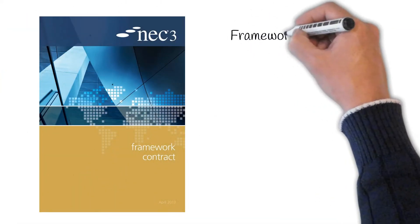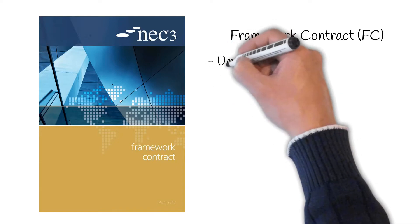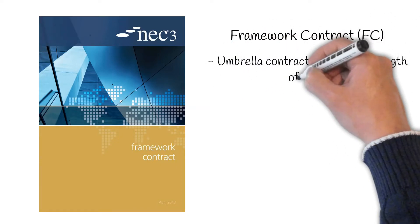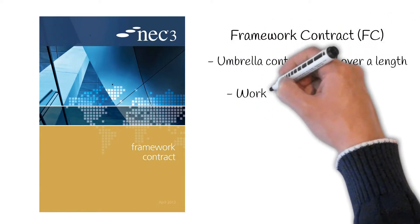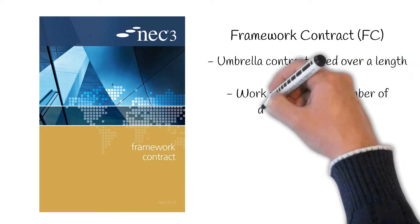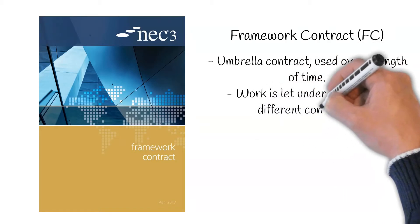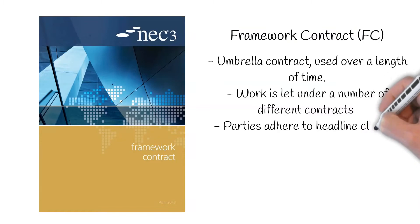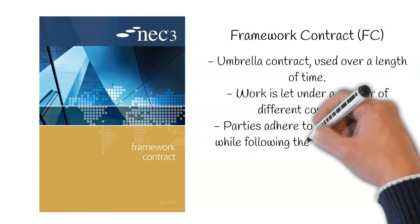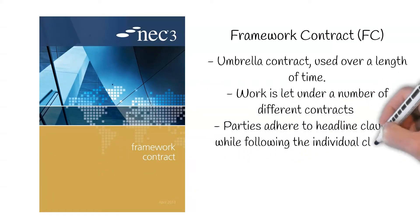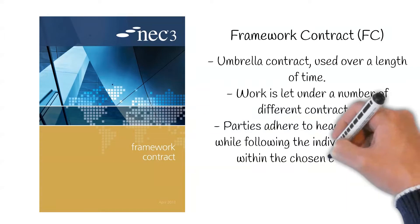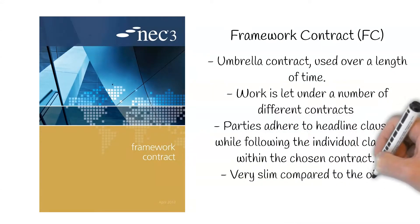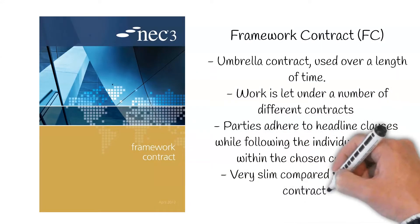Framework Contract, or FC for short. This is an umbrella contract which is used over an agreed length of time. Within that time frame, work is let under a number of different call-off contracts. This means that parties will adhere to the headline clauses within the framework contract, while following the job-specific clauses within the call-off contract. The framework contract is often very slim compared to the other contracts.